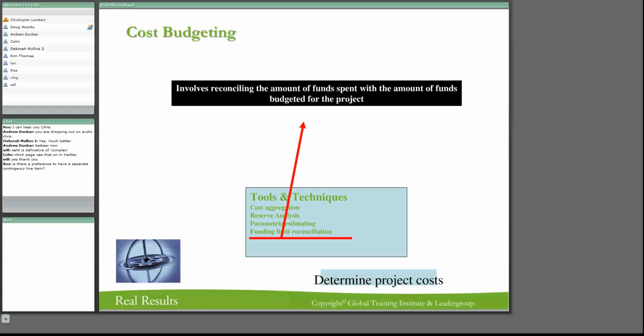So although a bathroom might cost you $1,000, when you buy for 1,000 rooms, you're obviously going to get a better price for that when you go out on tender. So you might say in the beginning of the project, well, it's cost us $1,000. By the time it's finished with the project, it should cost a lot less.